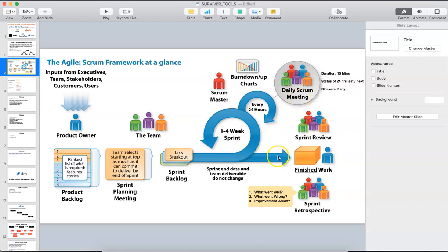Once the first sprint is over, it will be showcased as a demo to the other people. Then the second sprint will start. Assume that there are 2 backlogs and only one backlog is completed in sprint 1. The backlog which is pending in sprint 1 will be moved to sprint 2.